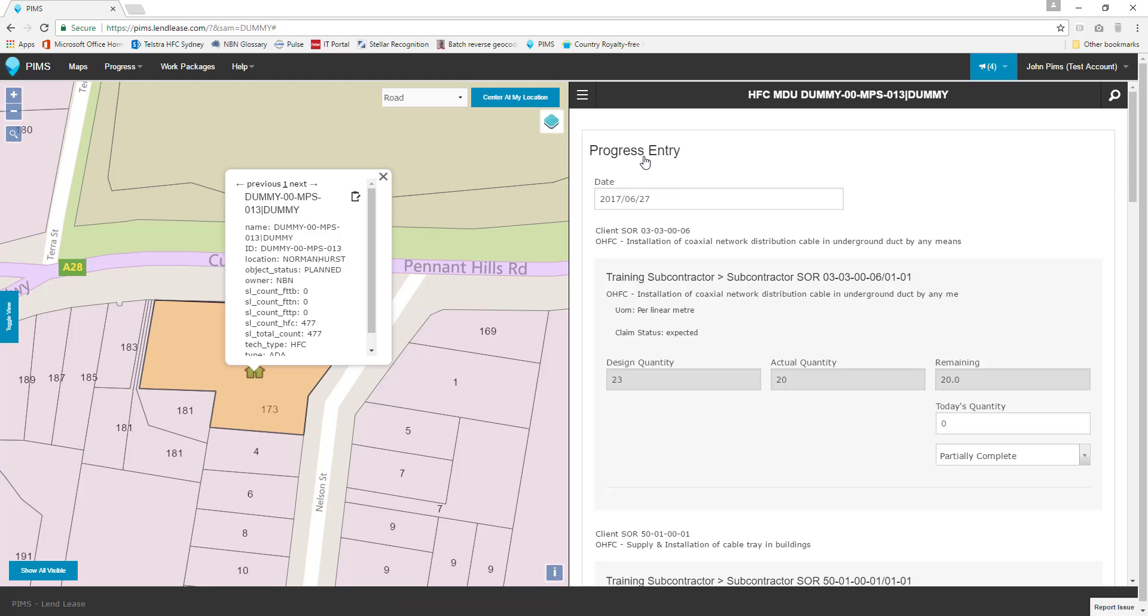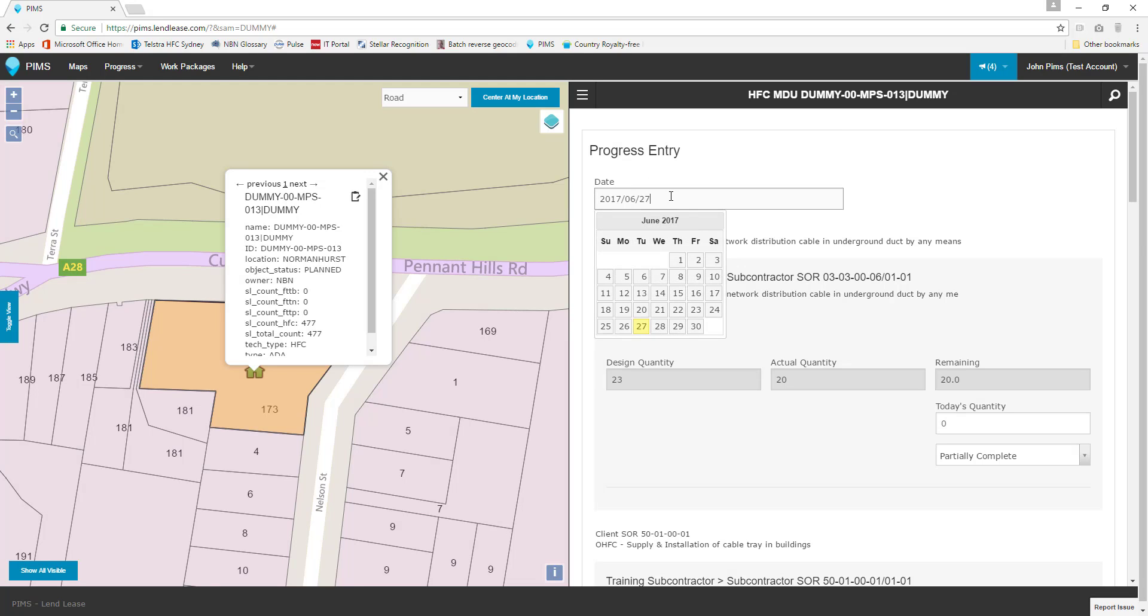Here we can see the current status of each schedule of rates assigned to us and create progress against it. The first field we can edit is the date field. By default the date is set to the current date according to your device. Progress entries should be made daily and record all progress completed on the day the entry is made.